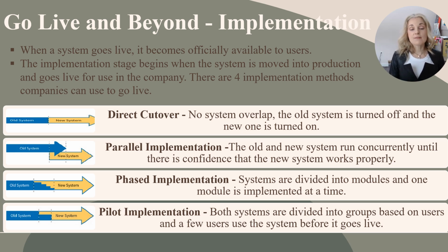Then we have a pilot implementation. This is usually done in large organizations. Basically what occurs is that individuals are divided into groups, and some users try the new system, everyone else is using the old system, and then when the pilot group doesn't have any problems, everyone switches over.